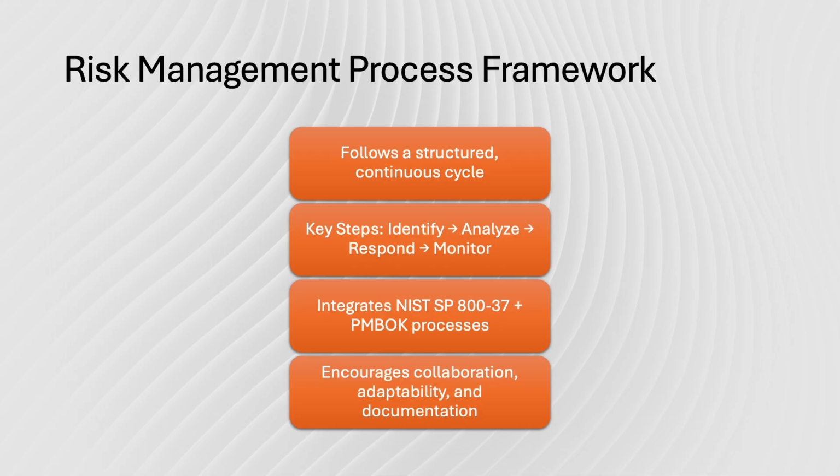The process begins with risk identification, where the project team, stakeholders, and subject matter experts work together to identify possible risks that could affect objectives. In our cybersecurity awareness and training program, examples include system downtime, phishing simulation errors, data privacy violations, or low employee engagement. Identification should be comprehensive and documented in a central risk register so that all risks are traceable and visible